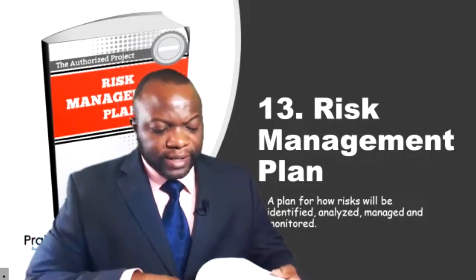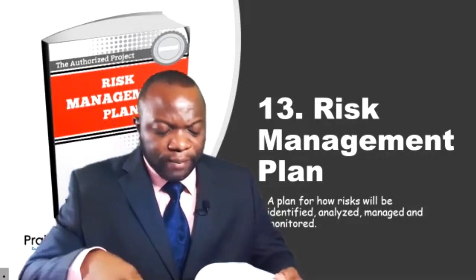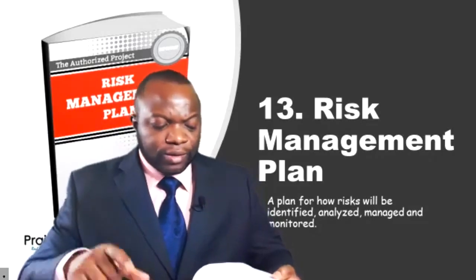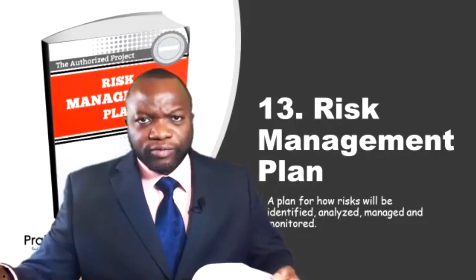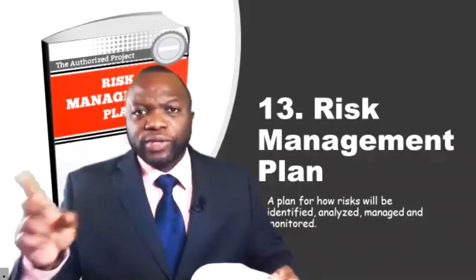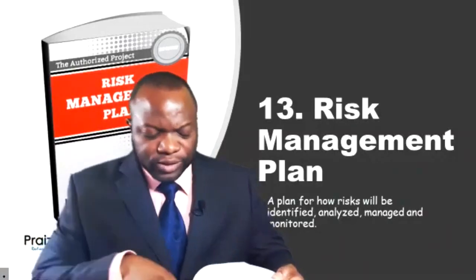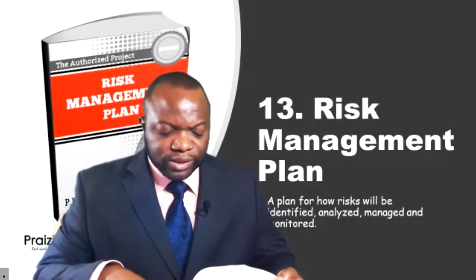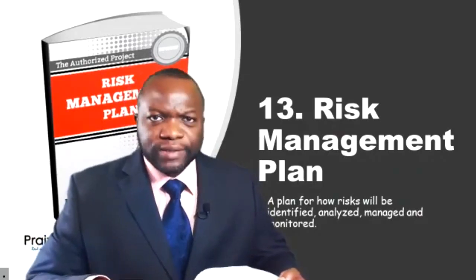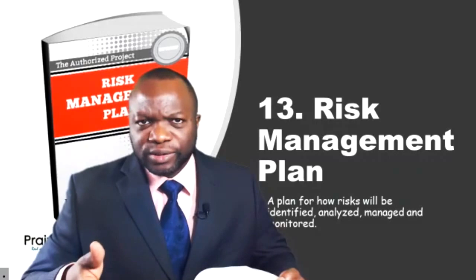The last bullet here says definitions of risk probability and impacts. This is big, and this is also a massive missing link on many projects, because a lot of project managers call a risk a 1 on a scale of 1 to 5, but they have not defined the 1 for the other stakeholders to understand what a 1 is. And that's why on page 407, the example of definitions of probability and impacts is a great takeaway for every project manager that manages risks using a probability and impact matrix without definitions. We have to define these.